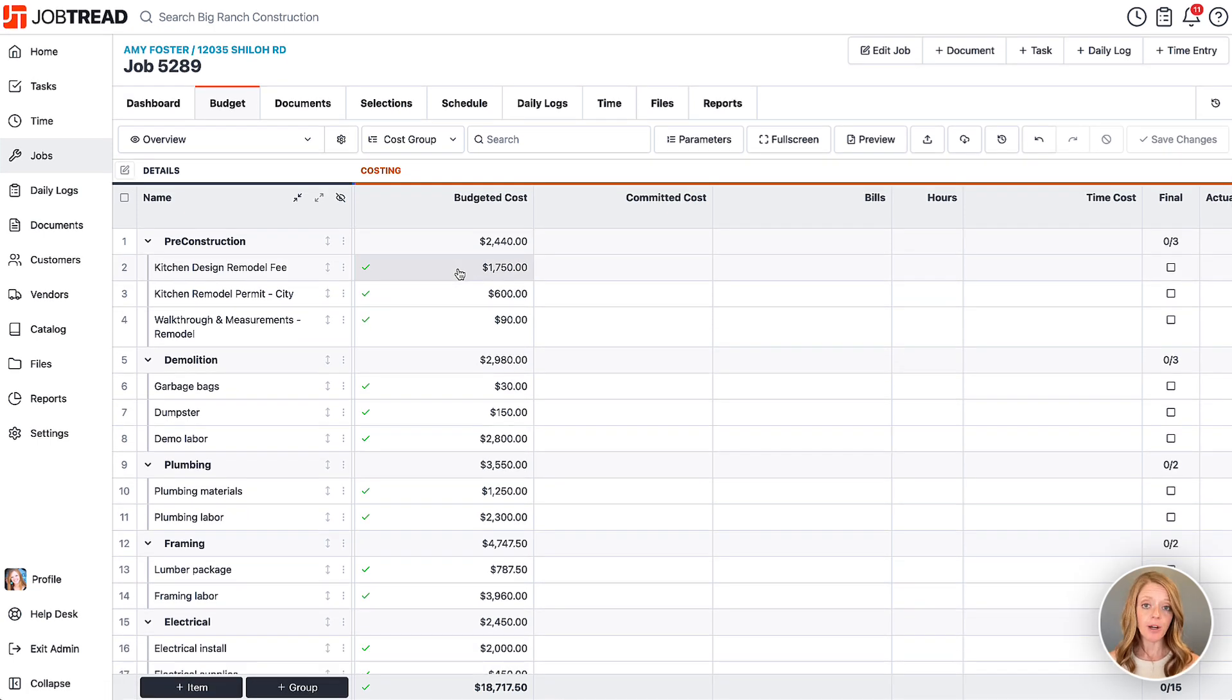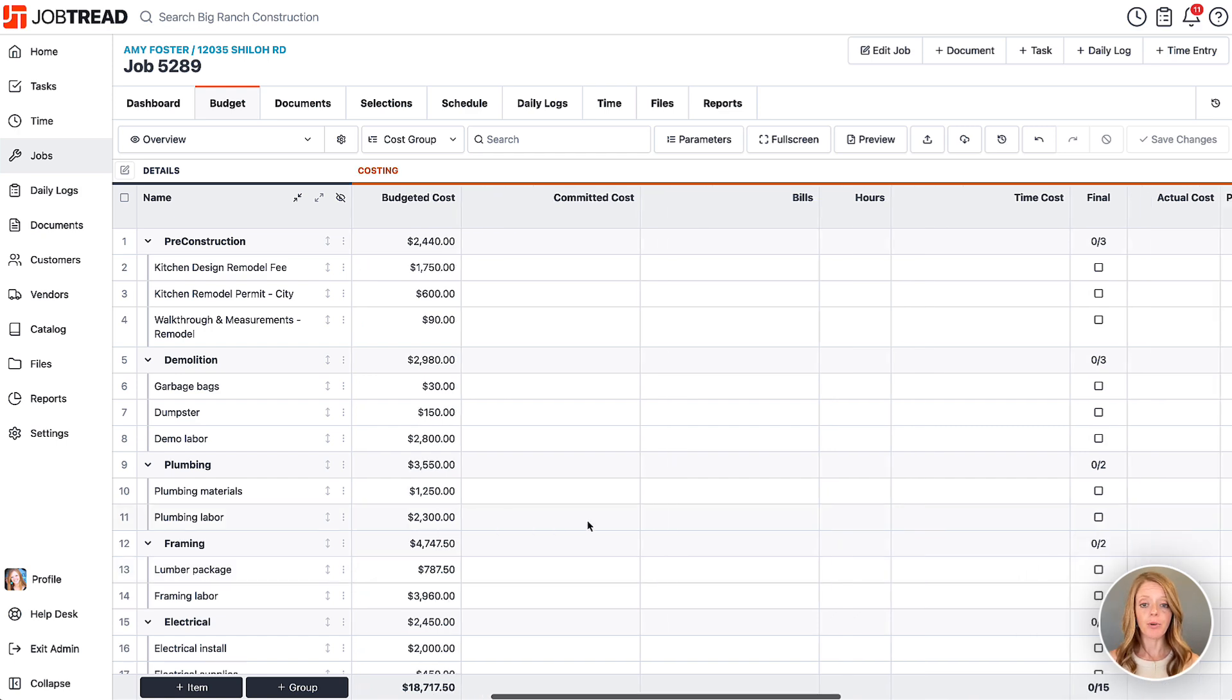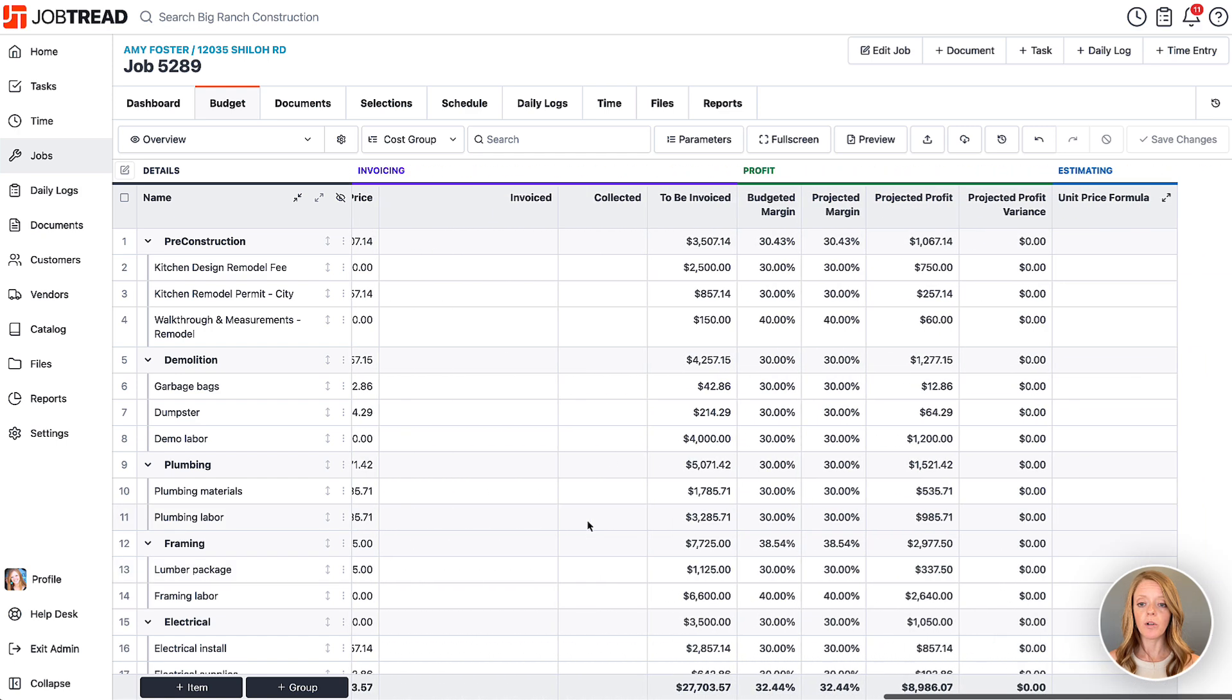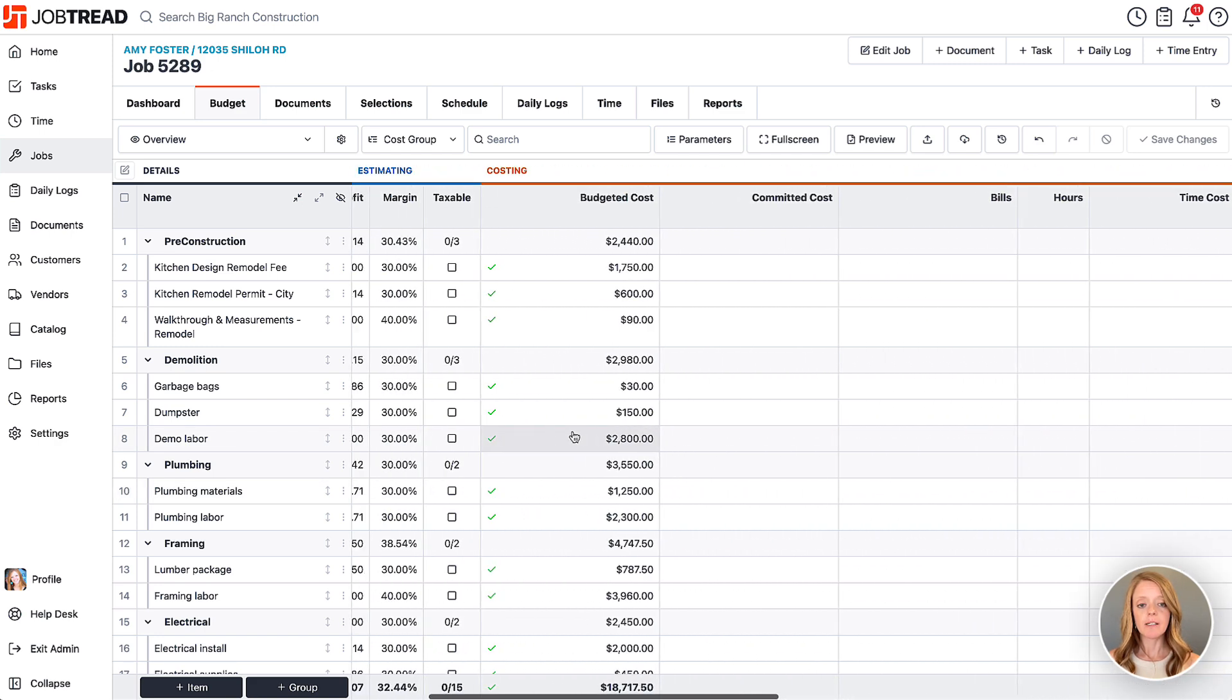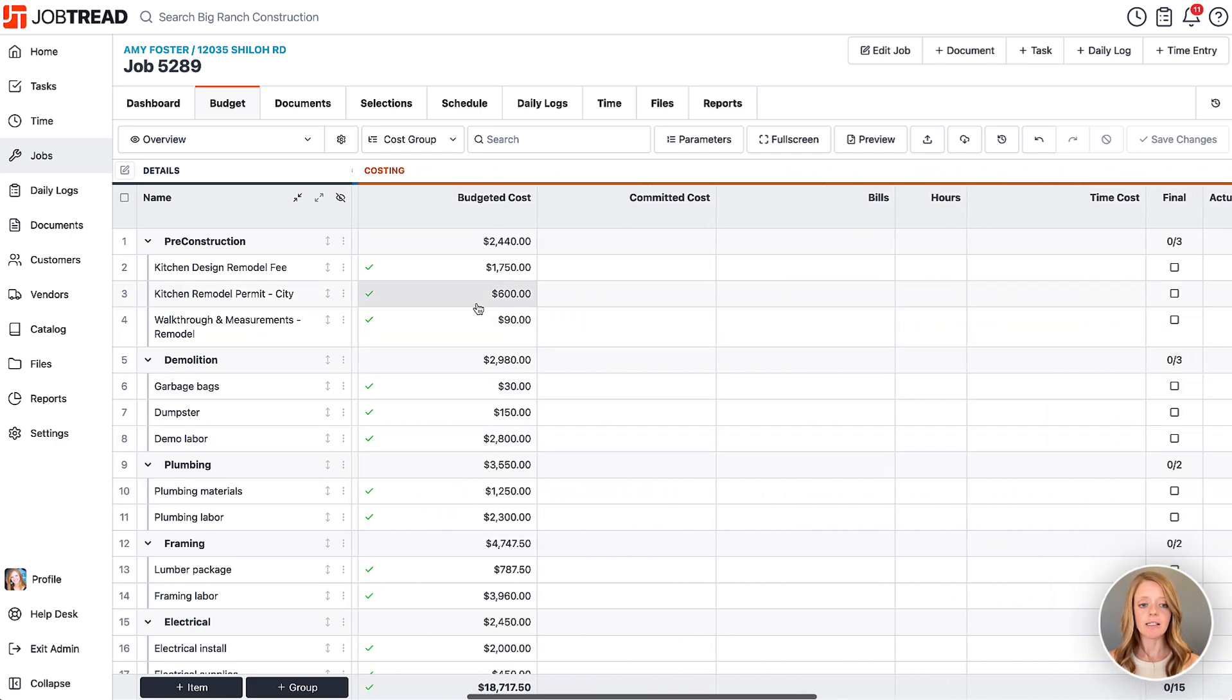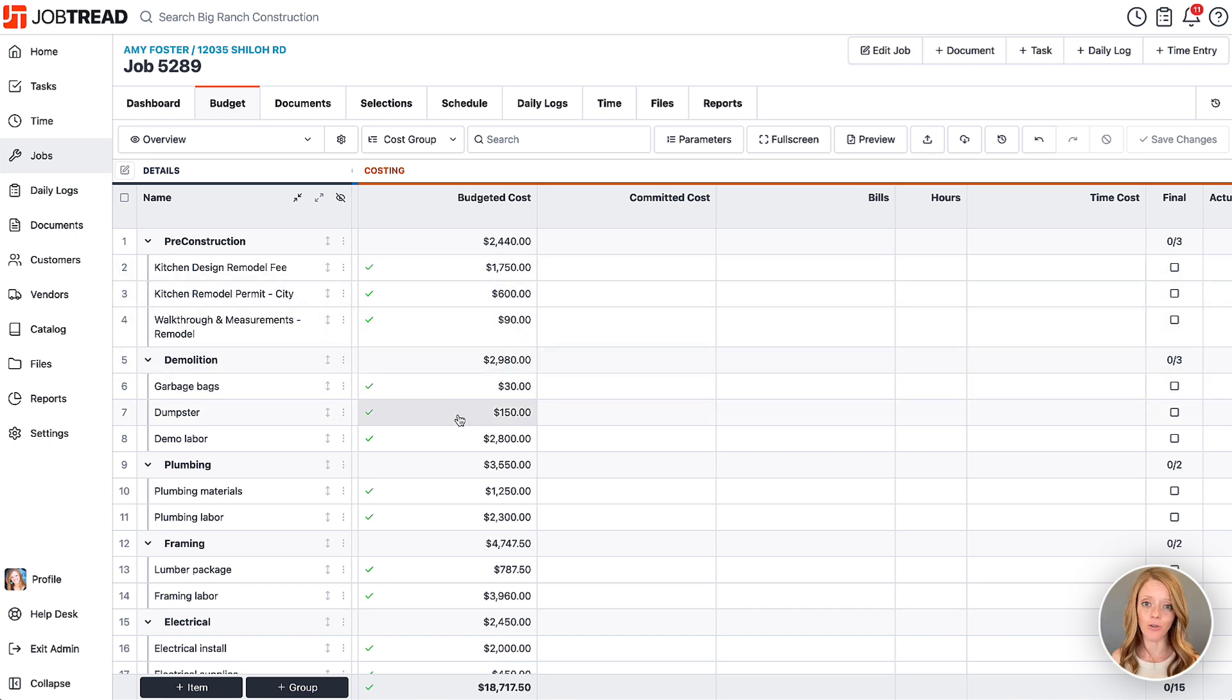In a fixed price job, this is your budget for the project. If you go over this amount for each of these line items, you're going to start eating into your profits, therefore your profitability for the project will decrease. Now if this is a cost plus job, this is the baseline budget. If you go over these numbers, you're just going to pass along the cost and any additional profits to your customer, so you're not eating away at your profits - you're actually tacking those onto the overages.